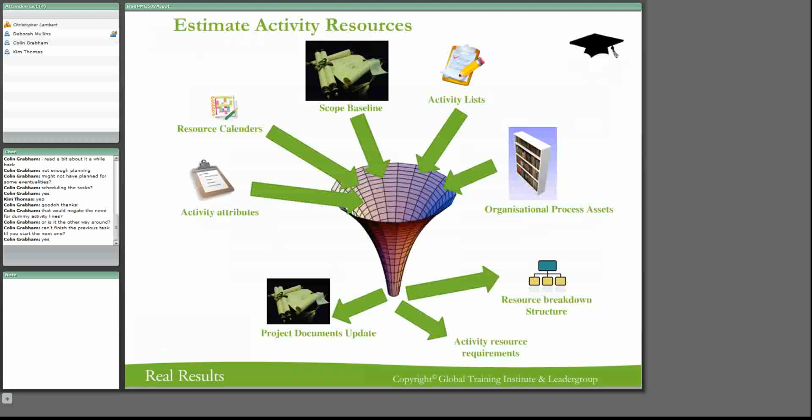So that's going to come into you. Now, the resource calendar is important because there's certain resources that will not be available, and it's going to have an impact on your duration. Right? So let's just say that you have a contractor, and the contractor cannot start before a particular date, and he's going to have that there. So it is an external constraint that says you can't start before this because the contractor can't start before that time.